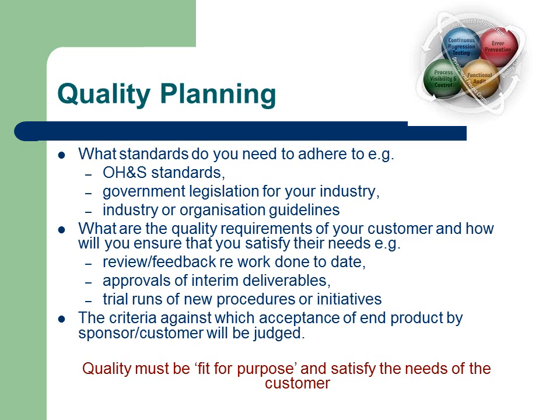This will describe the acceptance criteria for each deliverable and what processes the project will undertake in order to ensure the desired quality is produced. For example, what reviews will be included, what testing or inspections will be undertaken, will there be any trial runs of the product. For technical projects, the quality plan is often supported by detailed documents such as detailed testing plans containing an overview of each test to be performed and the expected outcomes.